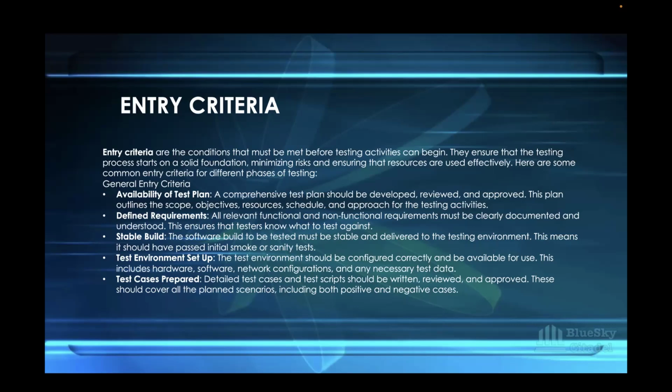You have to ensure that acceptance requirements or acceptance criteria meet the definition of ready and done. You have to ensure that all these things are ready before testing can start. And as a QA, you can challenge, not in a disrespectful way, but when a PBI or a requirement hasn't met the definition of ready and done, it doesn't meet the entry criteria, you can tell the business analyst or whoever that this hasn't met the entry criteria. This is not ready for testing.